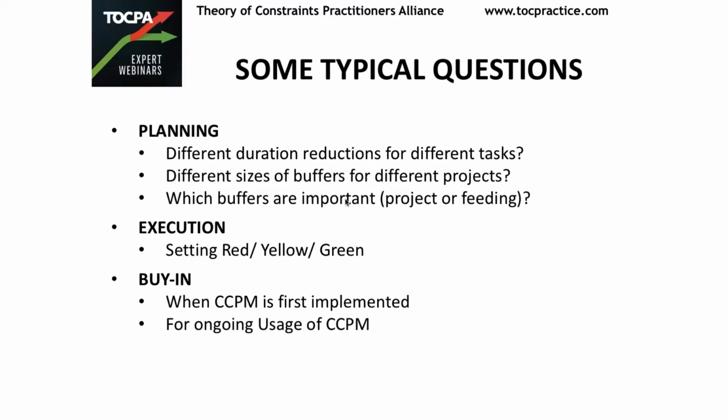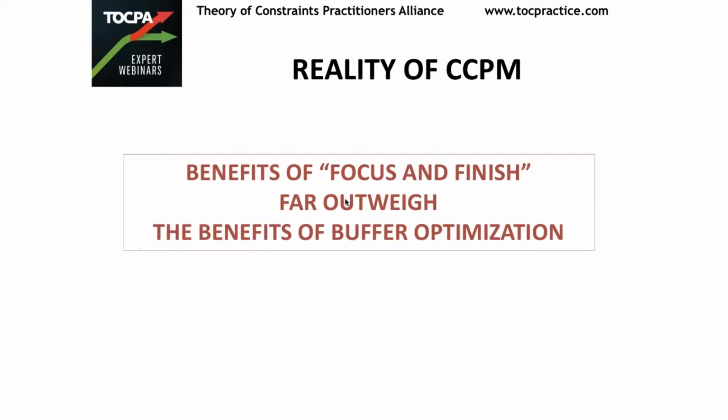So what happens is, even in successful implementations, if you are managing to finish a project in, let's say, 18 weeks, over time the duration expands because people start inflating the estimates in response to what they have observed in terms of cutting the durations. So these are the questions and challenges that I think are important, practical questions.